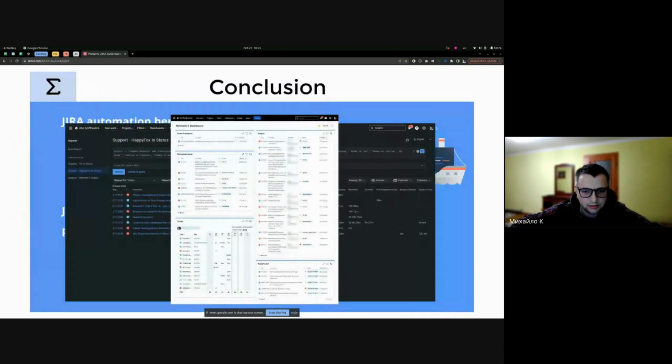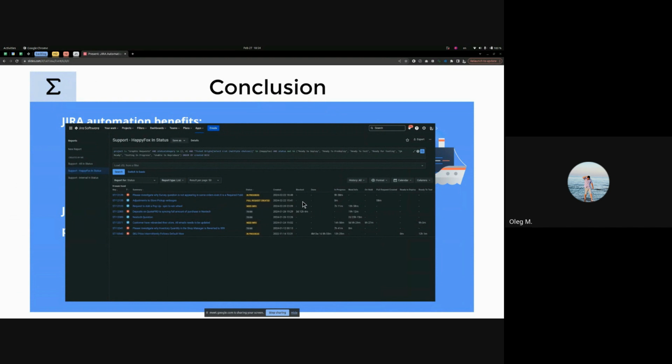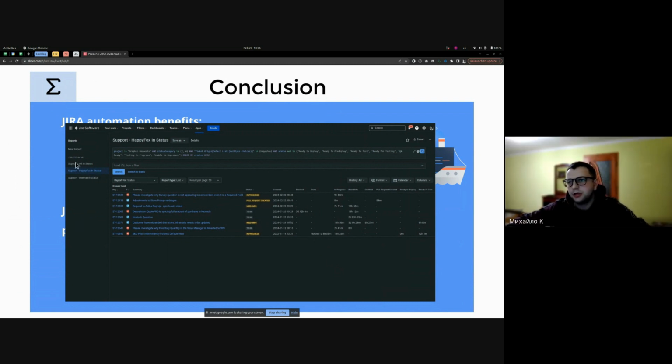So it's just getting all tickets for some specific JQL and filling in all statuses where it was. It adds specific columns only for the current report, and these columns are the statuses you have in your workflow, and this widget gives you time in minutes for each status for each ticket. So to add it into some bigger report, you have to build two reports and measure the data. Okay. Yeah. Here I prepared a few of what I use. So it's like a filter and just statuses and time. Okay. Time for that ticket.